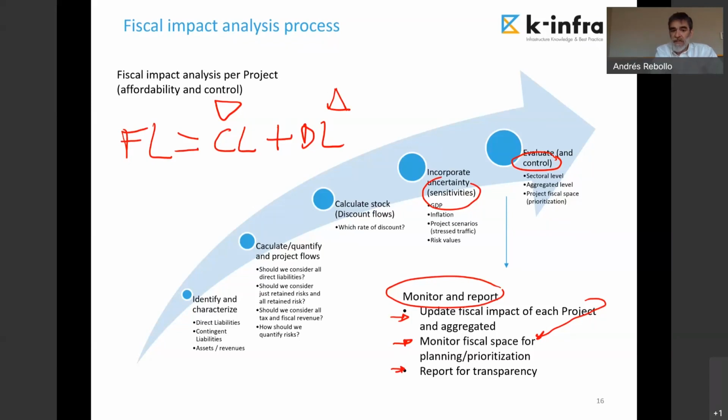So when I am transferring risk, I am in fact transferring contingency liability value into the direct liability value. This, generally speaking, for the majority of the risks is going to provide value for money, because in the majority of the cases, the value of the risk for me, probability multiplied by potential impact, according to my experience and my ability to manage risk, is going to be lower.